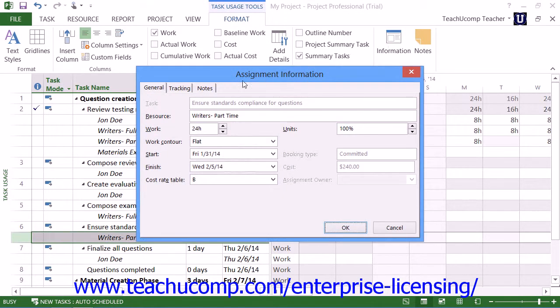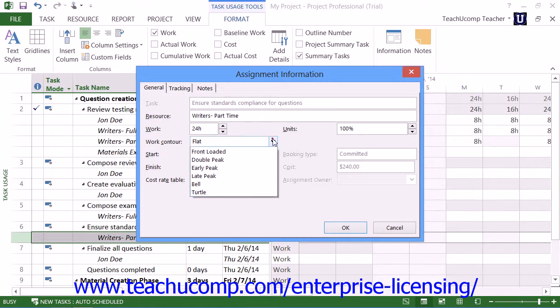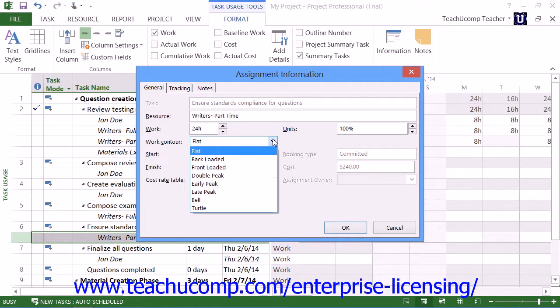On the General tab within this dialog box, you can then use the Work Contour drop-down to select the desired work contour to apply to the selected work resource for the selected task.